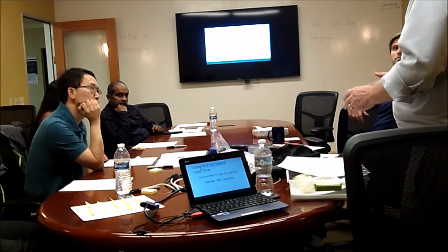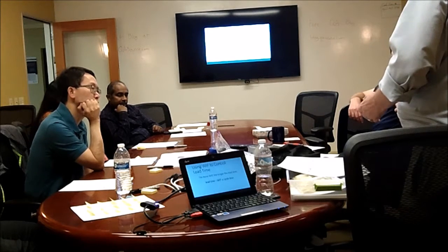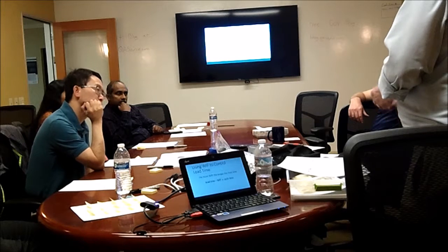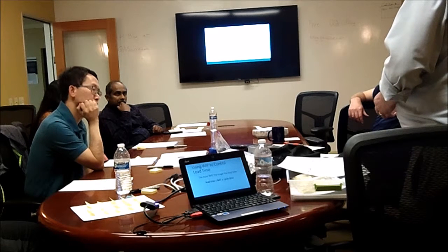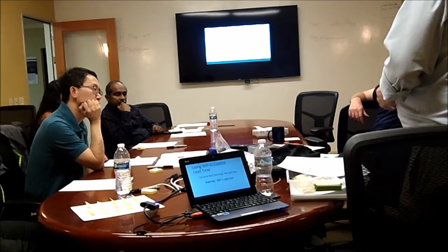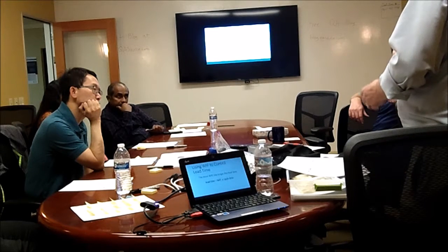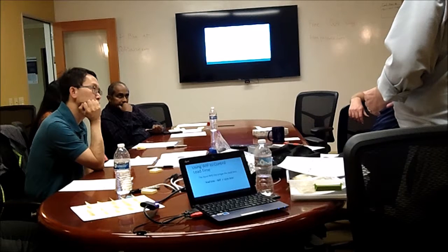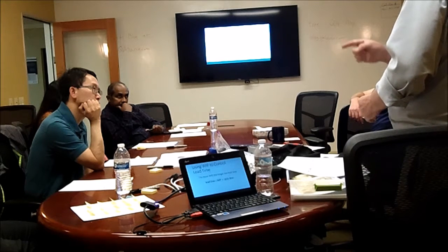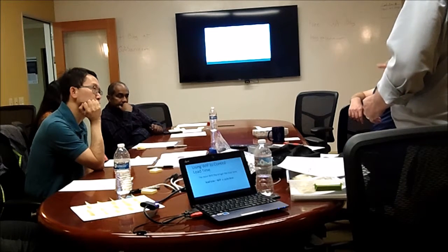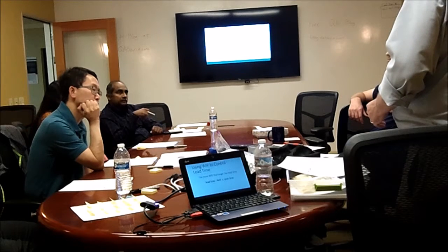And once it becomes populated, then you can get a real metric for it. But this is close enough to demonstrate the principle that if you have limits on the amount of work you have in process at any given time, then you can calculate how long it's going to take any unit from anywhere to get done out the end of the system, right?